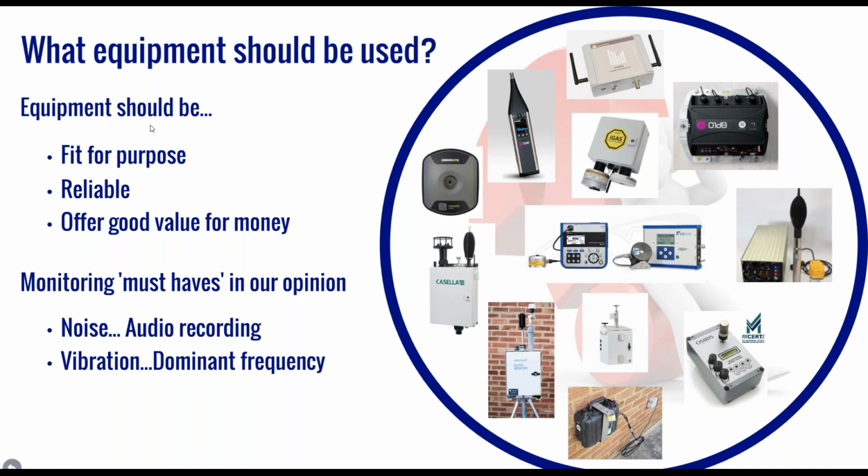For vibration, the monitoring devices should identify frequency that has caused any exceedances. This is because construction activities typically generate low frequency content, and if the sensor is picking up vibration outside of these frequencies, then it could be sending false alerts. And finally, for dust, monitoring devices should be MCERTS. This is the Environment Agency's monitoring certification scheme, which is built around proven international and European standards. This ensures that monitoring data is of a high standard.